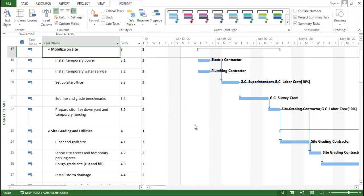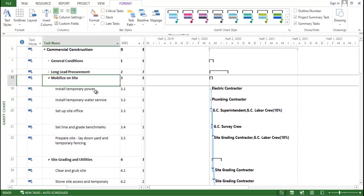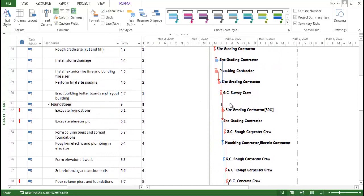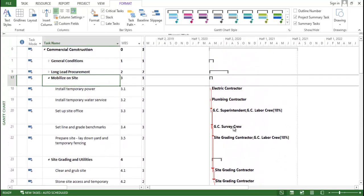There is also the ability to see the critical tasks of your project, which is a very important part of project management. Click on 'Critical Task' and you will see a red line highlighting the critical portions. This critical path defines the longest duration path for your project, showing the major tasks that determine the overall project timeline.